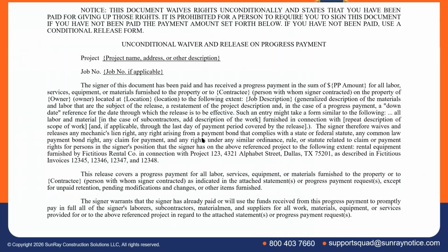So if you sign this and you receive a check and the check bounces, you may be out of luck. We're not sure. It hasn't been litigated yet. So please don't be our test case. Here, you're going to fill out the "to the following extent" portion of this waiver, towards the middle of that form language where you see "to the following extent" colon. Fill it out the same way, right? What you did, who you are, and which invoices or which pay applications are being paid.